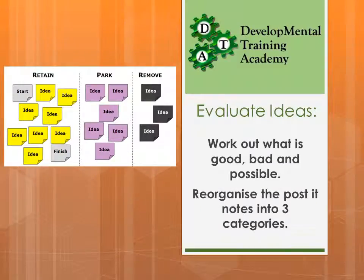Once you've brainstormed a list, you need to evaluate your ideas — work out what's good, what's bad, and what is actually a possibility in the future. We tend to separate it into three categories: ideas to retain, ideas to park for later, and ideas to remove altogether. We then reorganise the post-it notes and fit them into those three categorisations.